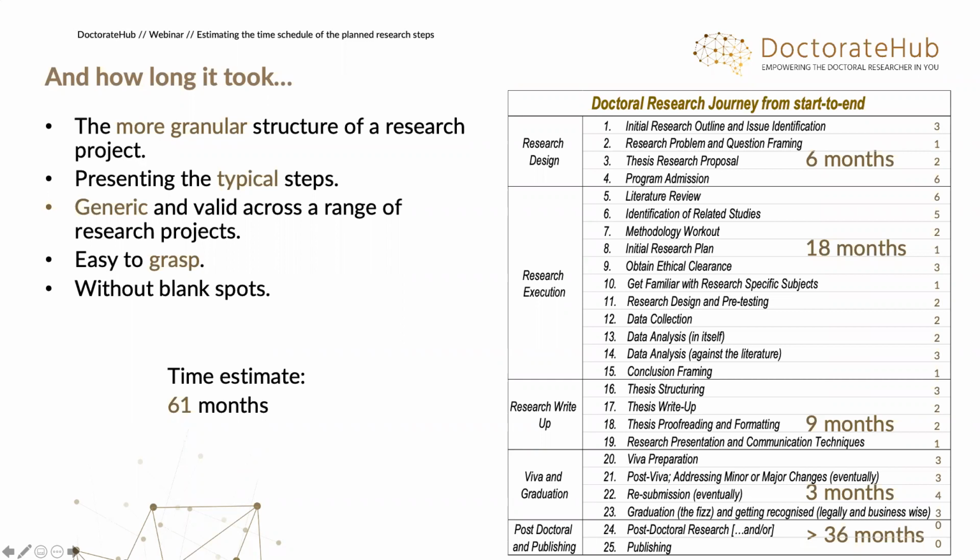So you will do a bit of literature review also once you are doing the data analysis, which is points 13 and 14. And once you analyze the data itself, like at point 13, you might also go back to the methodology to adapt it in accordance with how you structure your data. So as said, written in a linear way, yes, executed in a non-linear way. This obviously enhances the level of complexity on how to forecast the time that you will be spending on executing your research project.